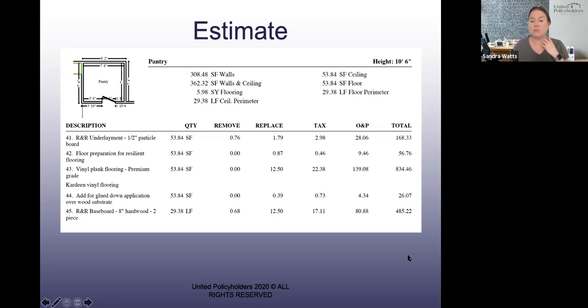The only things they should be able to depreciate on your building estimate are things that wear out: roofing, flooring, carpets, paint, those types of things. They shouldn't be depreciating framing, concrete, or anything like that. So that's all I'm going to be able to say about depreciation today.